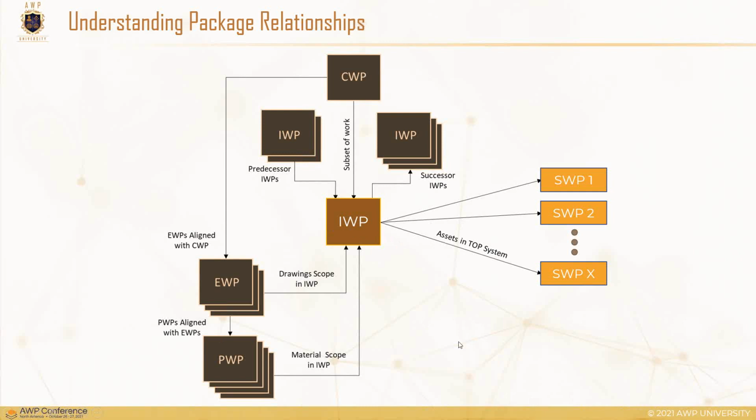All right, so IWP, that's the physical package. These are actually printed or sent on a tablet out to the field. They are the pivotal point of execution. Everything before that's paper shuffle to satisfy the actual execution, which is where the cost is, right? The actual construction. And the IWP, it being issued to the field, has all of these influences that need to be considered.